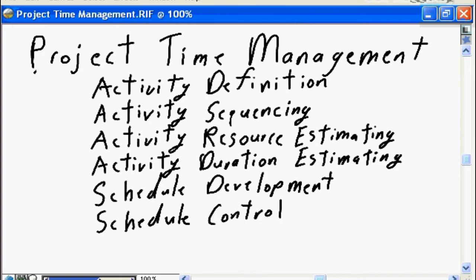Nugget, the first of a series of 2 on project time management, we will focus on schedule definition, the activities associated with preparing the project schedule. This covers activity definition, taking the WBS initially defined during scope management and breaking it down to a further level of detail where single activities, single tasks can be assigned to single individuals.